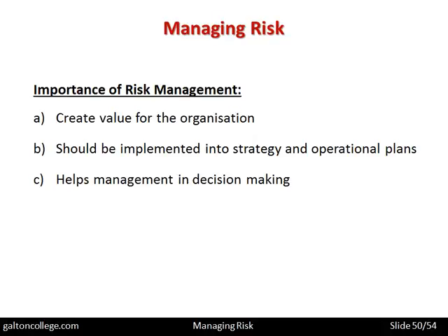It helps management in decision making. Whenever management make decisions, they should factor in the risks. Sometimes management do this by looking at the most optimistic outcome they could expect, then what is likely to happen, that's a second alternative, and thirdly, the pessimistic outcome, and then trying to decide, are they optimistic, pessimistic, or neither? So when they're making decisions, this should build in some element of risk assessment.